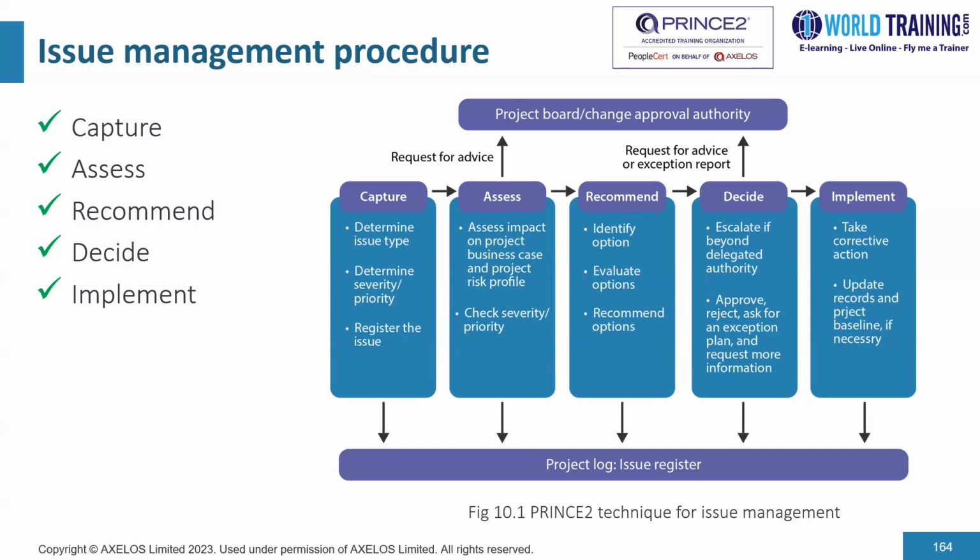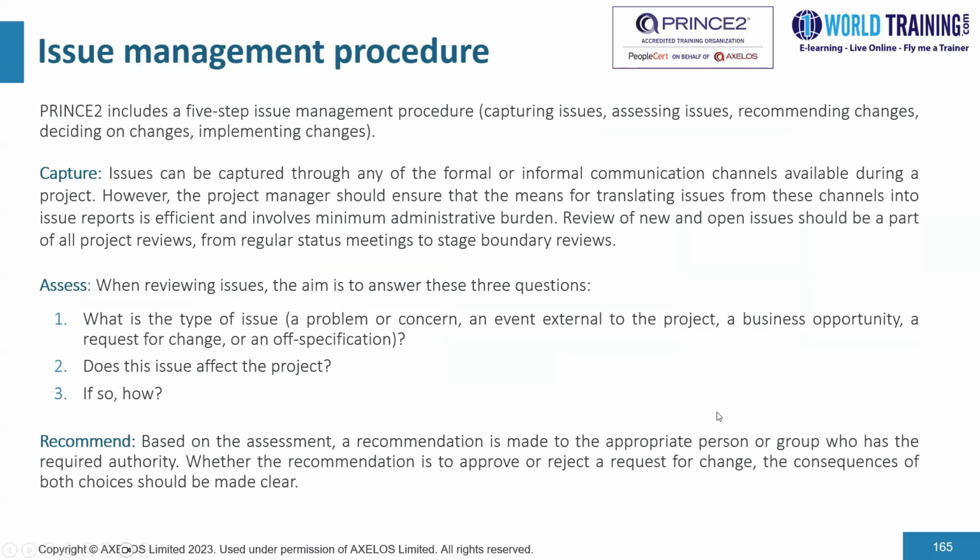And finally, as a part of the implementation step, we take the corrective action, we update records and the project baseline if necessary. So this is a 5-step procedure. And some additional thoughts on the procedures on the next few slides.